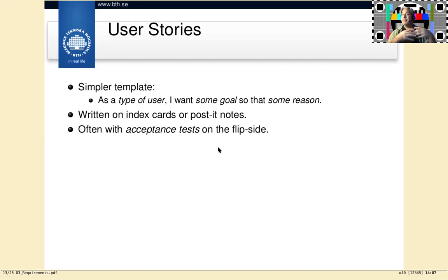And then we can have a detailed discussion on what is the most important of those, and then break them down into further details again, so that the requirements or the user stories that I'm going to work with for the coming 3 weeks, they are clear enough so that I know exactly how to build them, but not clearer. There's no point in specifying too many details either. It should be sufficient so that I understand how to build it. It should be sufficient so that I can talk to the customers about them.